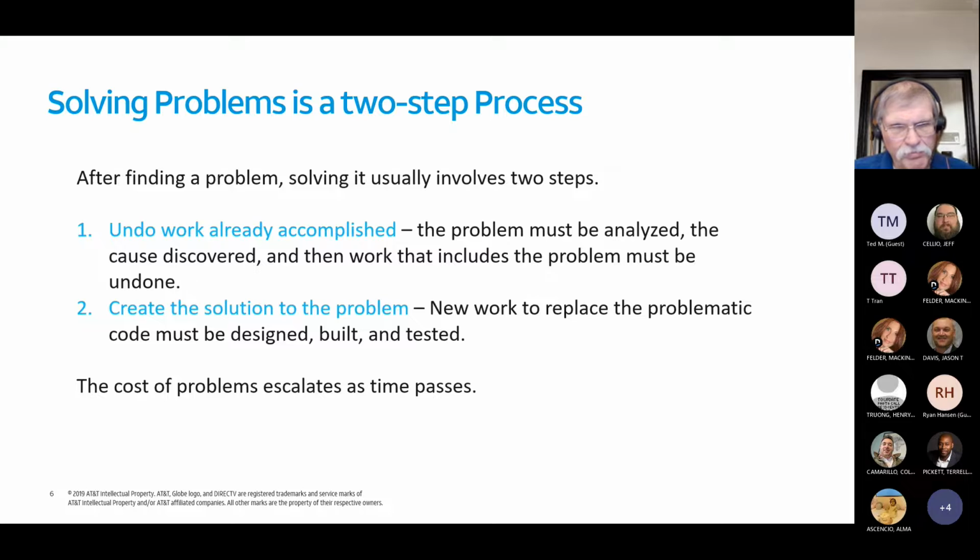Because if we have an issue, it's going to be contained within a Scrum time box, okay? Usually 2 weeks. So that's really what we have to investigate: all of the interfaces that we touched there, the functionality that we implemented there, rather than waiting until everything's deployed and then trying to figure out exactly what all has been touched, what all needs to be fixed, and to make sure that nothing else is affected by it. Okay? So we want to catch things early.